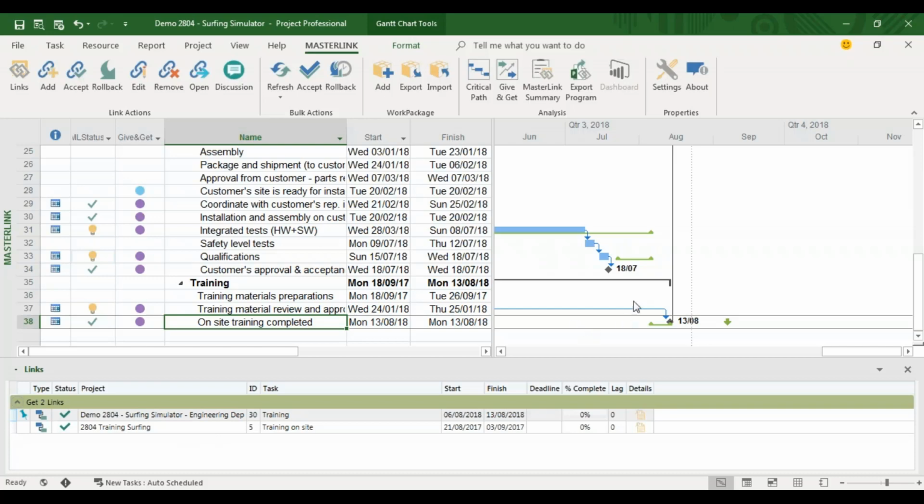In such a case, what we will see on the Gantt here in green is just one task. And this task that we're seeing is the one that is indicated here with this green pushpin, which is the impacting task. So I know that this one is the critical predecessor right now, and if anything changes here, then my work plan will change. And of course, this is recalculated as the project moves on.